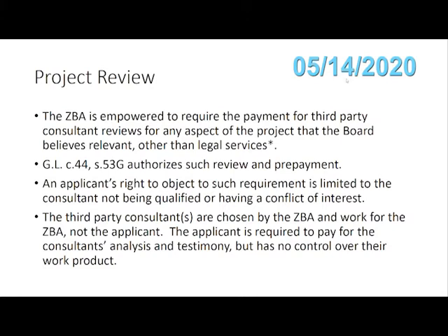A question came in about whether the Conservation Commission order of conditions counts in the uneconomic assessment. No, great question. No, the uneconomic analysis is going to be what the Board of Appeals does to the project. Now, an applicant in their pro forma will have as a line item permitting costs, and they will build into that line item of permitting costs what it's going to cost to go through the Concom.